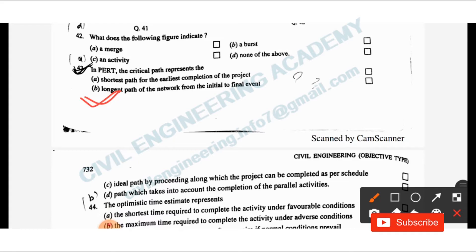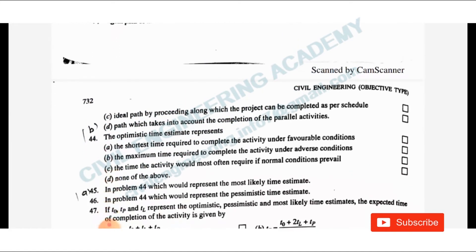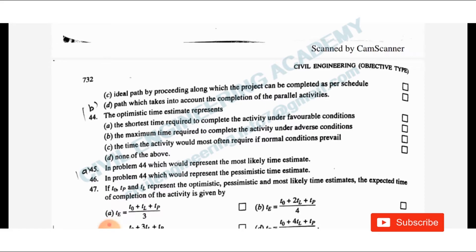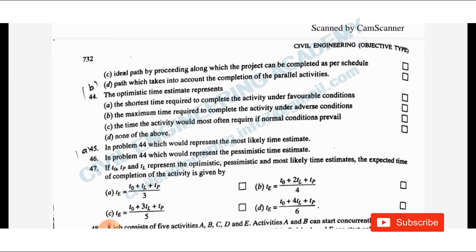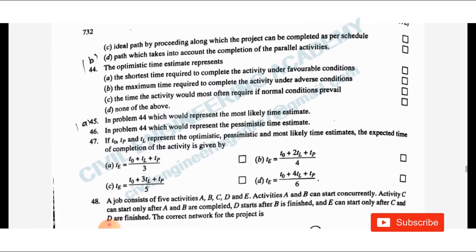Question 44: The optimistic time estimate represents the shortest time required to complete the activity under favourable conditions — option A is the answer. The pessimistic time is the maximum time required under adverse conditions. The most likely time is the time the activity would most often require if normal conditions prevail. Optimistic is favourable, pessimistic is adverse, most likely is normal conditions.